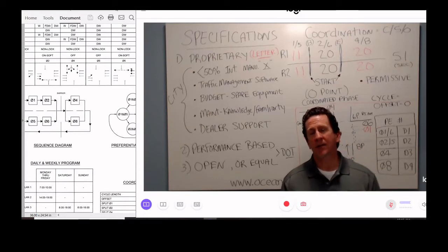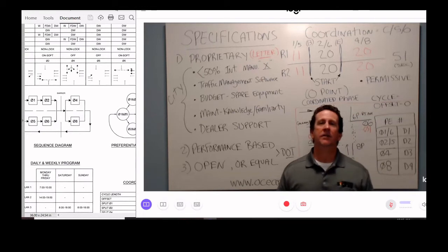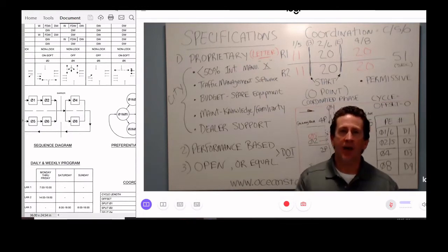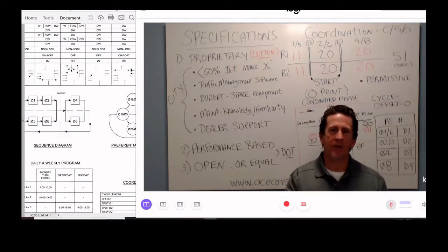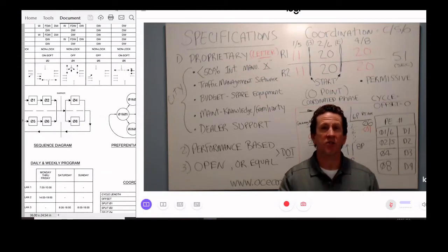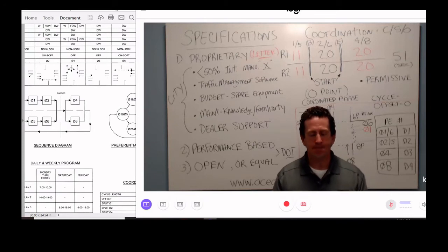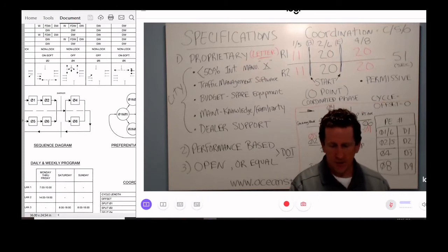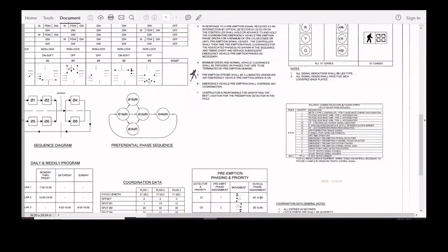They used to be like 3 or 4 pages. Now it's like a 20-page document. When a project comes out, you hand that to the consultant and say, this is what we're looking to do, help us do this. And the consultants don't mind it because it gives them guidance. You just save them a bunch of work. And then that gets built into the plans and specs. So that's the specification. Very, very important. So the first thing that's going to translate into over here is our